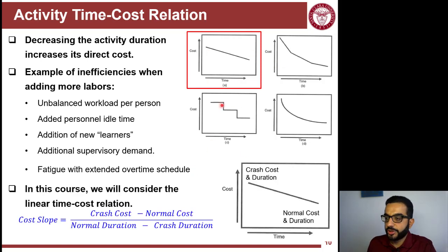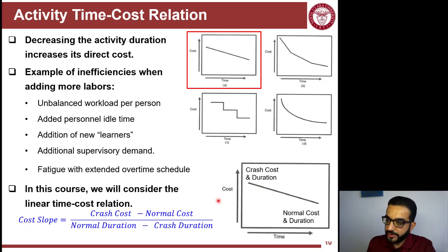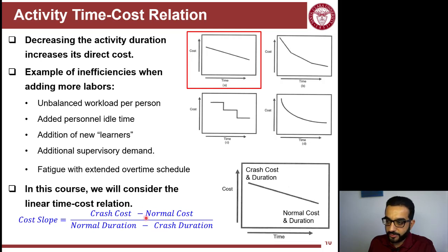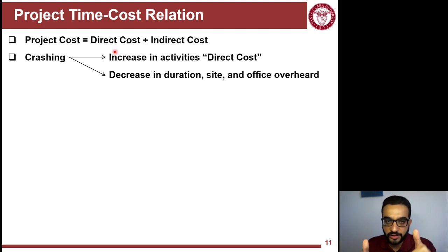Following the linear approach: for each activity, you are given normal duration and corresponding normal cost, plus the crash duration and resulting crash cost. This produces a cost slope — the difference between crash cost and normal cost divided by the difference between normal duration and crash duration. Note the flip in the fraction: crash cost is higher than normal cost, but normal duration is longer than crash duration. The more you squeeze the activity duration, the more cost you incur.